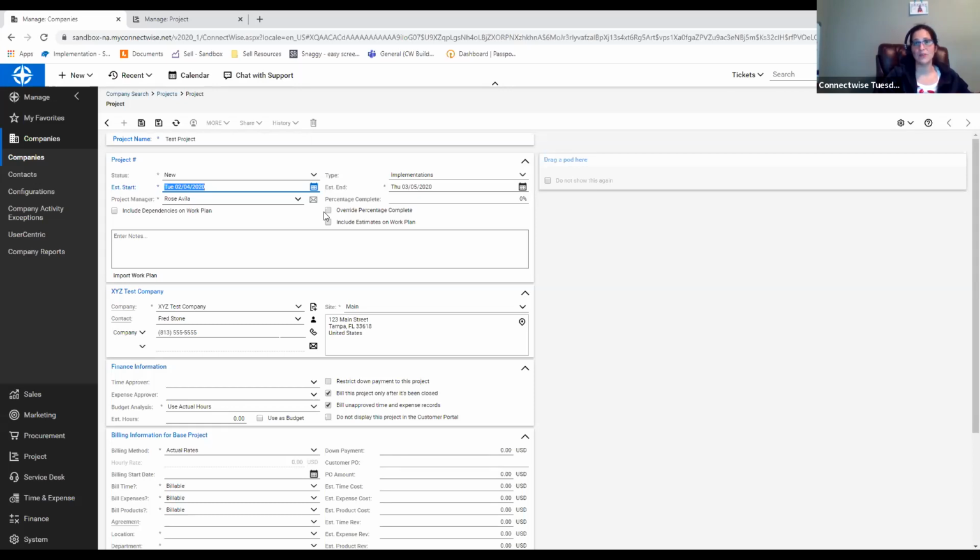Doing that will give you the ability to budget your resources and planning so you can give accurate project timelines to your clients and say, you know what, you're going to sign off on this now, but right now our estimated lead time is going to be 2 to 4 weeks, right? Because that's when we know we're going to have the bandwidth to actively work on it and make sure that we're successful and not dropping the ball on other projects because we're kicking off a new project without necessarily having the resources to do it. We're setting good expectations during the sales process that's going to take us there, okay?